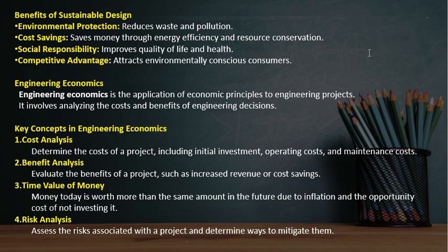Okay, 50 BD extra price. So you buy the one which is less energy efficient, but that AC is costing you more bill. Okay, so you save 50 BD in the price, but now you are putting 5 BD extra every month in the bill. Okay, so we have to look at the overall cost.